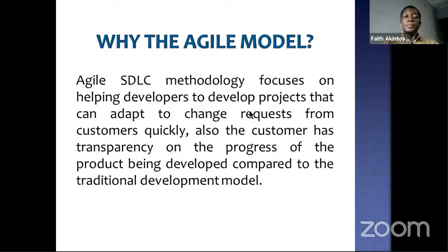Okay, so now why the Agile model? The Agile SDLC methodology focuses on helping developers develop projects that can adapt quickly to change requests from customers. Also, the customer has transparency on the progress of the product being developed, compared to the traditional model. The traditional development model, which I highlighted earlier as the waterfall model, is where you can't go to the next phase of the project if one phase is not completed.